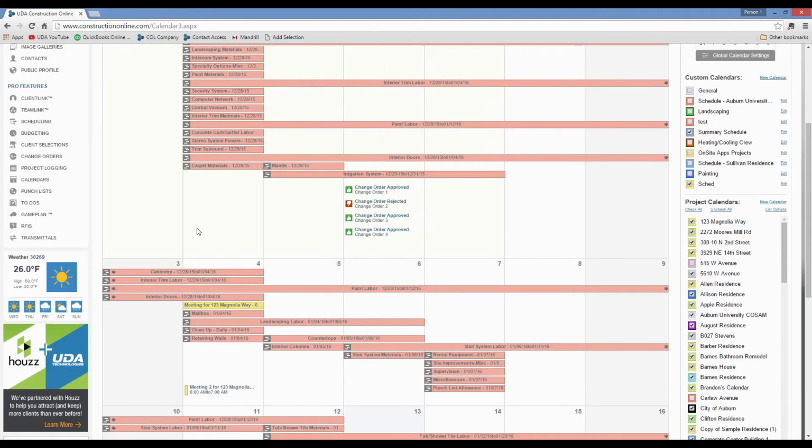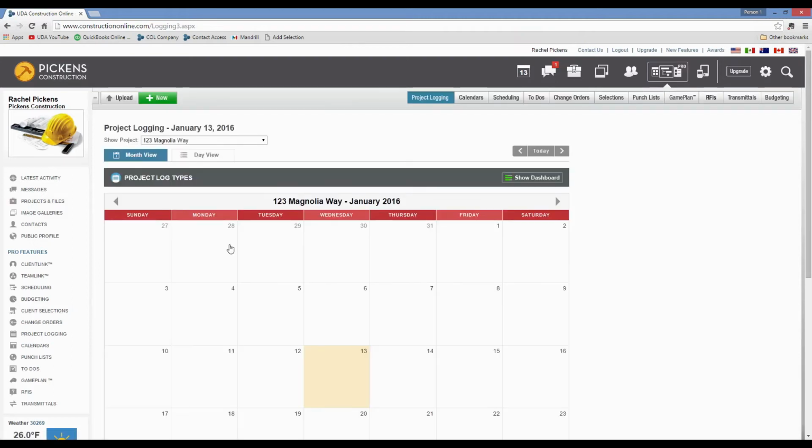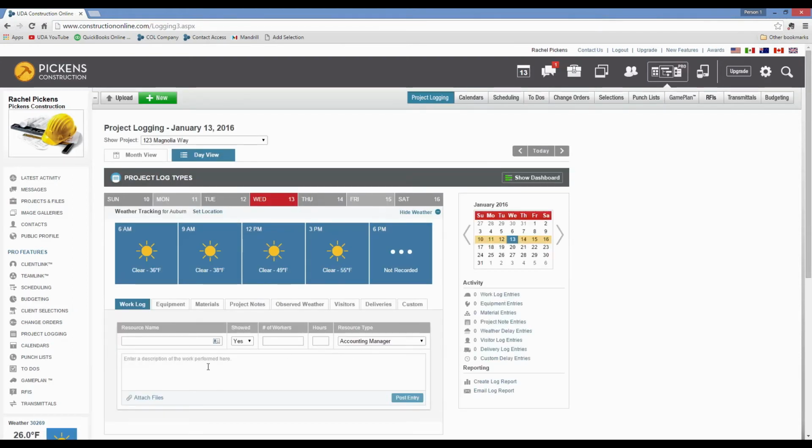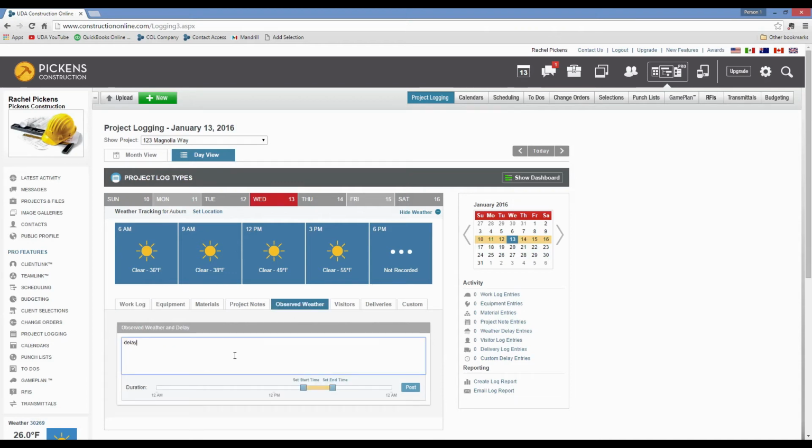But if you get to the end of the job and you're 2 weeks late on it, and you say, oh, back 3 months ago it was raining and I couldn't do work, it's usually not going to fly as much as it would if you told them the day of, hey, we got rained out all day, we couldn't do anything. Yeah, absolutely. So this is again, having that clear communication that's going to be recorded, or being able just to document what exactly happened and how did that affect the job. Right, absolutely.